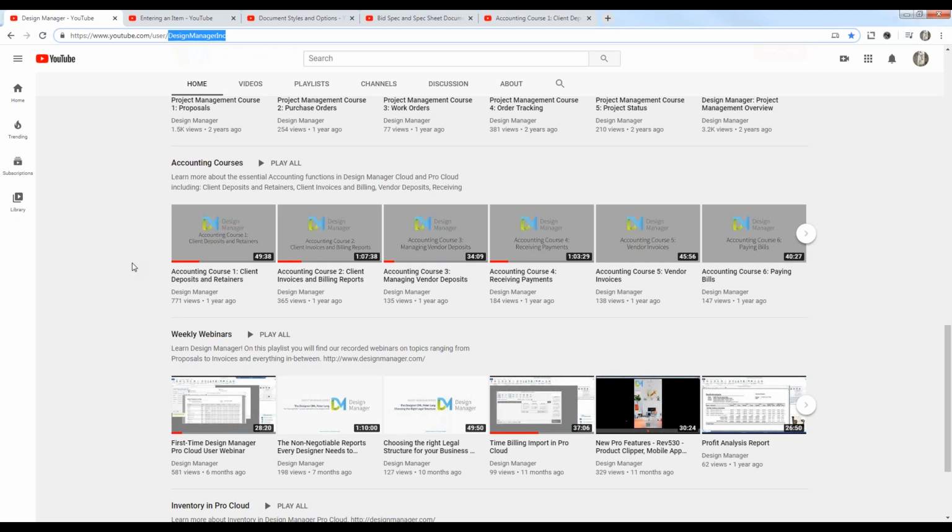You even have an option to create a proposal for each item in the project. Now, in this case, the item becomes its own, call it micro project, and can be easily, conveniently monitored throughout the entire design cycle. And the client effectively approves each item individually. Now, obviously, this is going to have the most overhead because you're going to have scores or hundreds of items in a project, and therefore an equal number of proposals to be monitored separately.